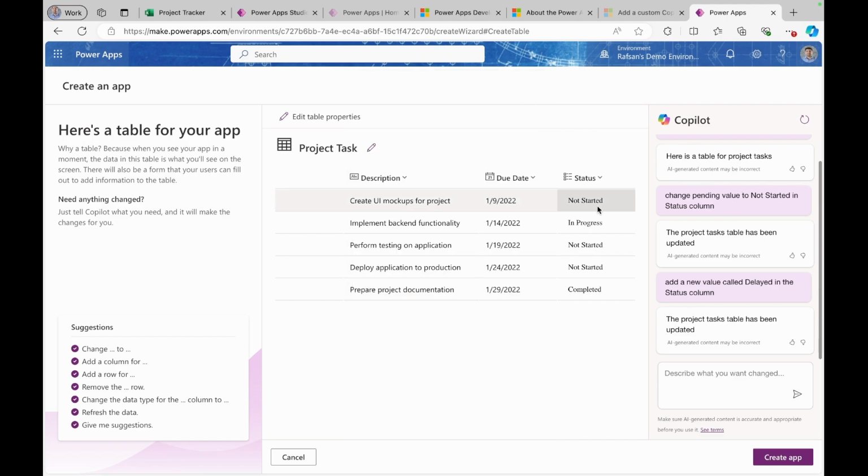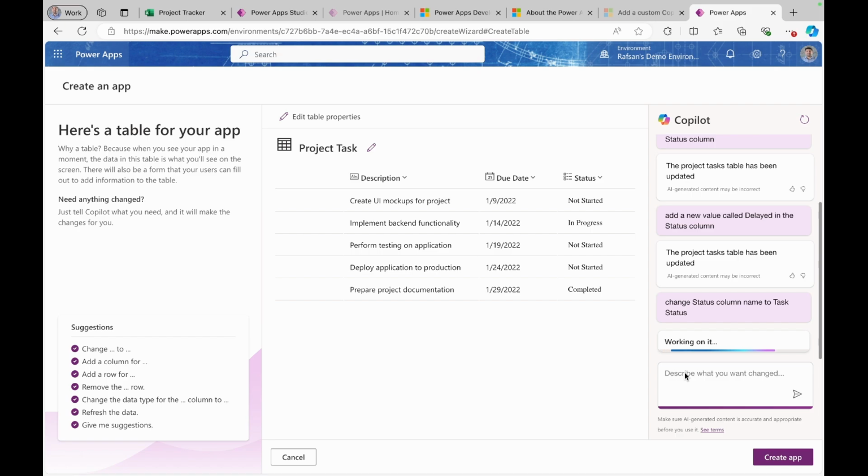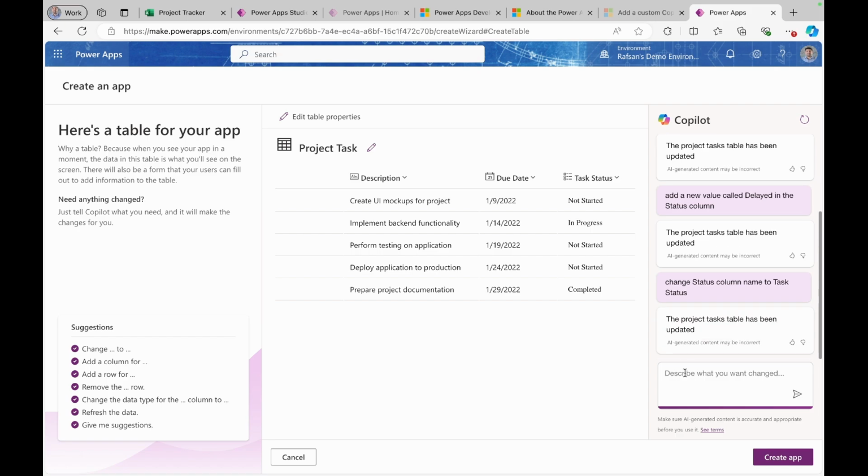So what I will also need to do here, I have many status choices, so I will make it more descriptive. You may not need to do that, but I have many global status choices, and sometimes it's very confusing. So what we can do here, we have description, we have due date, we can also add, for example, task status date, we can have duration and make it calculated based on the difference between due date and start date. We can also add who is a team member, an assigned team member, for example.